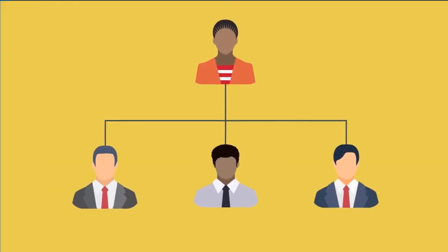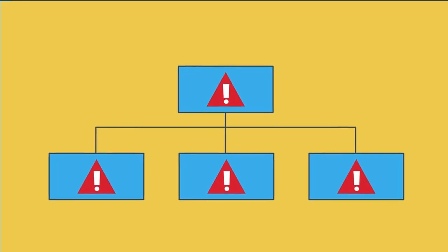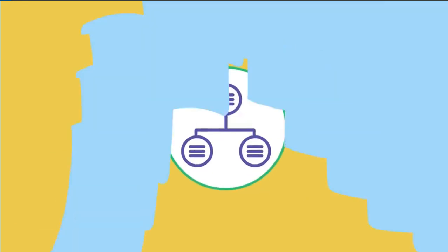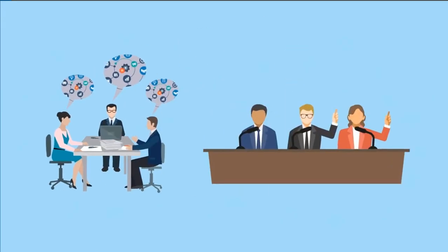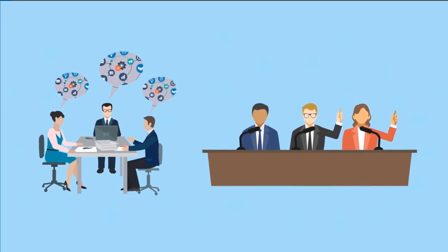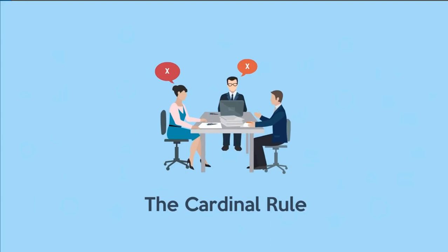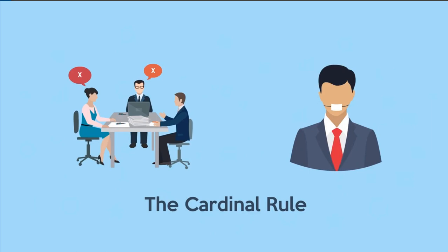Next, it's a good idea to structure the session somehow, maybe according to pre-identified categories like those found in the risk breakdown structure or in the work breakdown structure. The secret of good brainstorming facilitation is to make sure everyone gets a chance to participate. You've probably heard this 1,000 times, but make sure everyone understands the cardinal rule at the outset. No negative comments or criticizing anyone else's ideas. Also, no self-censorship that comes from a fear of sounding silly.